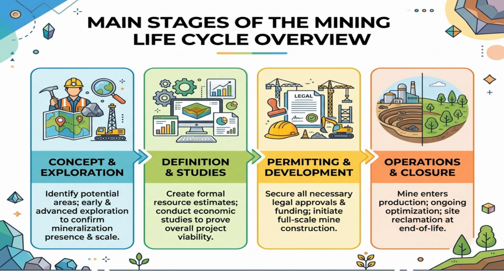At a high level, the mining life cycle can be grouped into 4 major phases. First comes concept and exploration, where companies search for promising mineralization. Next is definition and studies, when resources are estimated and project economics are tested. Then comes permitting and development, which includes legal approvals, financing, and construction. Finally, the mine enters operations, and, eventually, closure.